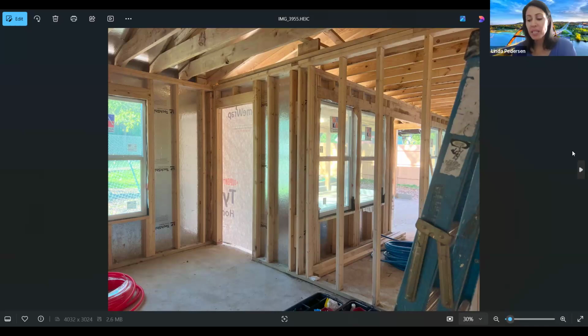Thank you. The other piece is that when you're doing a custom, they won't come out to measure until the tile is put in. So you're almost done with the house, then they come and measure, and then you've got a long lead time potentially. Plus the cost is like 3 times or more.